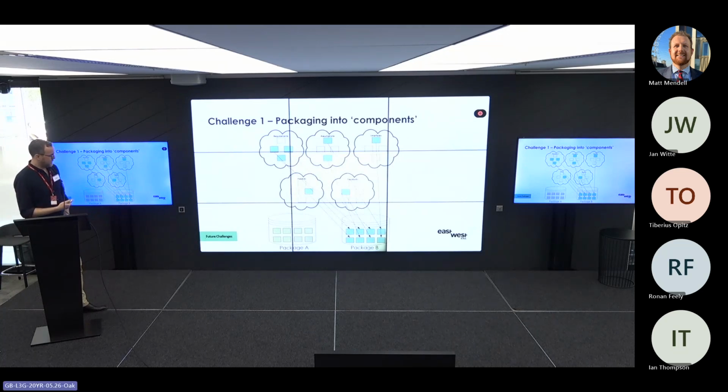The other thing that is worth noting is that, as I mentioned, some of this will be reused. So we need to think about that. I mentioned that some of the requirements, for instance, might be applicable to every station. So one of those requirements might be paint the station red. Well, that would be in package A and package B. But one of the requirements might be specific to Oxford in terms of the platform length, and that will just be in one package. It won't necessarily be in another package. So we've got to think about the way that we package this up into chunks that we can contractualize.